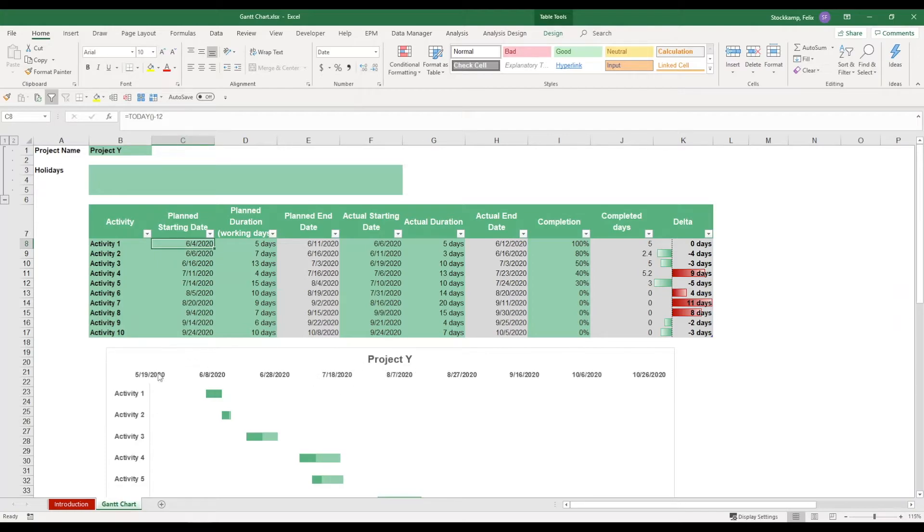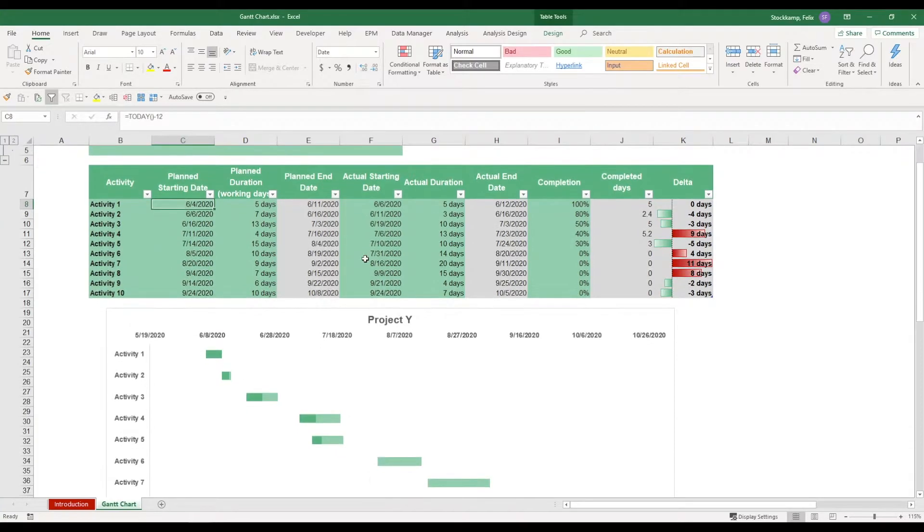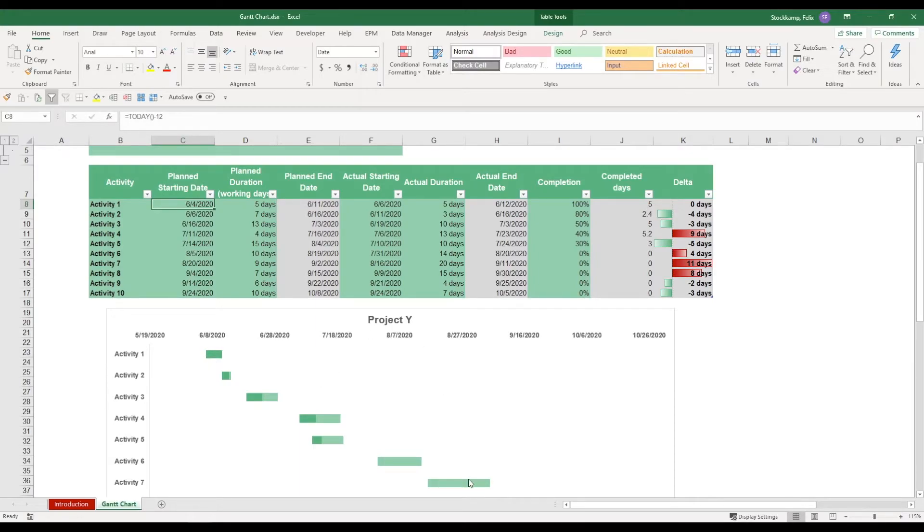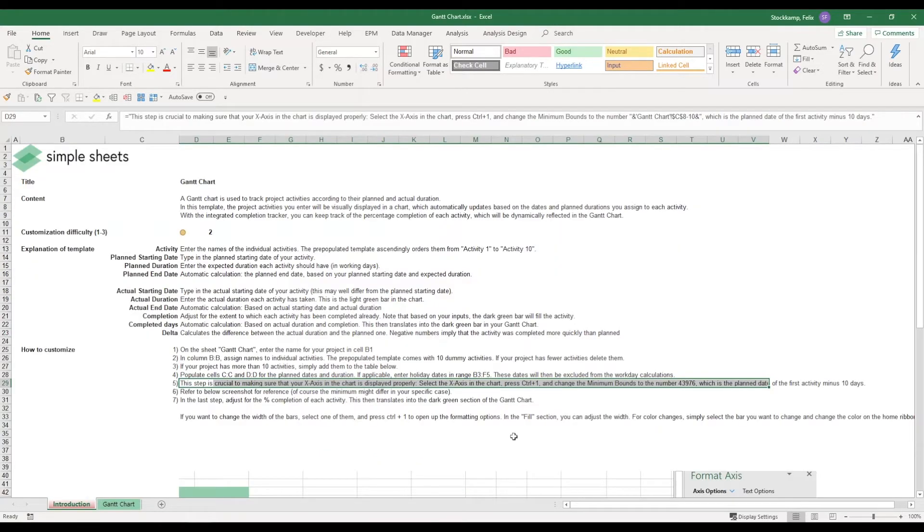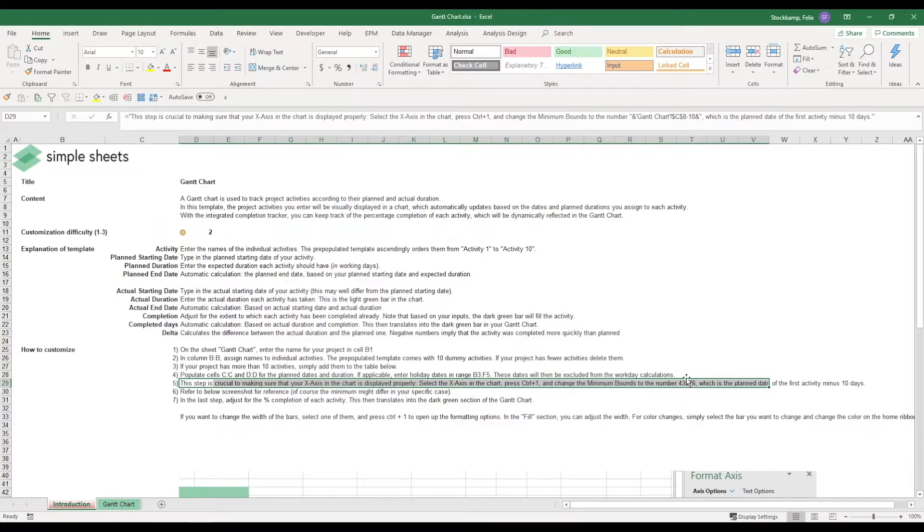Because otherwise the problem will be that your axis is not going to update correctly and some of the bars will not be visible. So let's quickly refresh our memory. Today I need to enter 43,976 as the minimum bound.